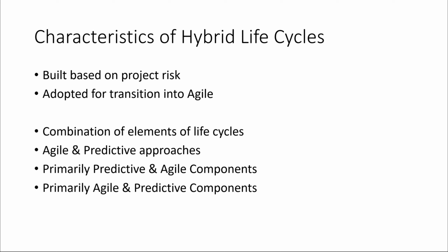Example of a hybrid lifecycle project. A pharmaceutical company had a time-consuming United States Food and Drug Administration approval process tagged onto the end of its development process, and its entire lifecycle looked like Figure 3-6. While project teams undertook drug trials in an agile fashion, they had to present the drug to an external group to perform the FDA approval process.